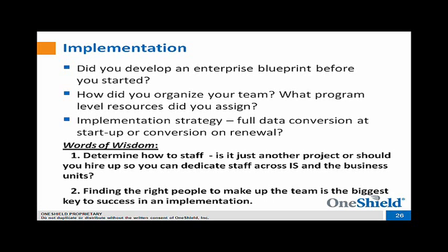And when all of those work streams are in play as part of your business and system transformation, you've got to have that architect up at the top, as Martina mentioned, as well as a program manager who can help all of those work streams align their timelines and also align and set expectations for when they all come together into a unified testing work stream at the end. So being able to manage multiple methodologies and keeping an eye on the critical paths and dependencies between those work streams that may be operating differently really requires a sophisticated leader at the top keeping an eye on all of those.